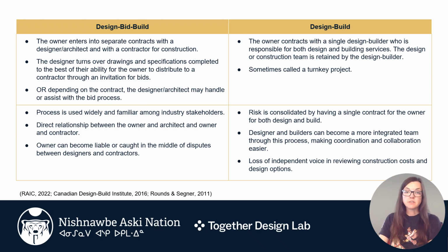Under design, build, the owner contracts with a single design builder who is responsible for both design and building services. The design or construction team is retained by the design builder. Sometimes these projects are referred to as turnkey projects. The risk is consolidated by having a single contract for the owner for both design and build. Designer and builders can become a more integrated team through this process, making coordination and collaboration much easier. Loss of independent voice in reviewing construction costs and design options.